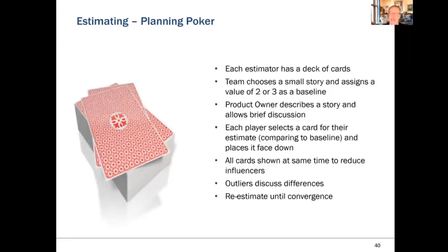Now, there may be cases where both of those team members are right based on their perspective and their experience. So consider maybe one person is a developer and they're thinking, well, this is a one-line change. That's a piece of cake, really easy to do. But the other person is a tester thinking, I've got to regression test that entire application. This is huge, right? This is a lot of work. So they're both right based on their perspectives.